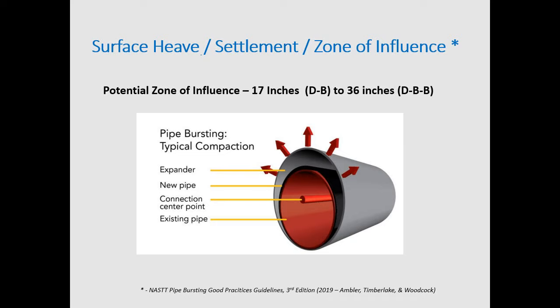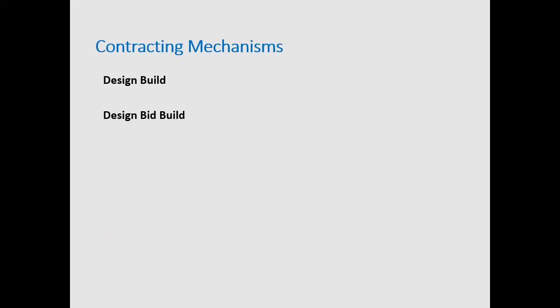And that their contaminated areas that they know of is a little bit different than the ADECs. So we met with their environmental group and had multiple meetings, right? Yeah, three or four meetings discussing it and just identifying the risks and letting them know. They had to do visual and odor checks while they were out there. If they found it, notify. I didn't get a phone call. I'm stating the facts: no news is good news.